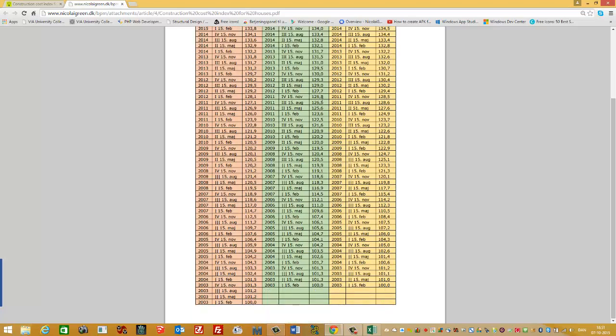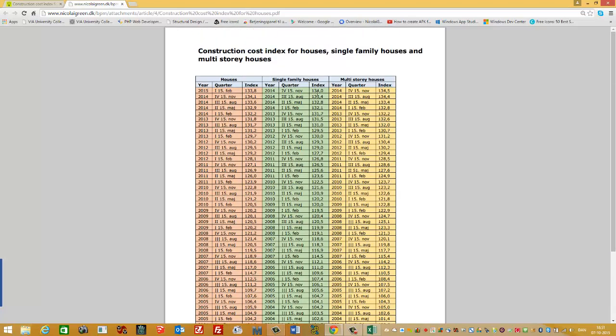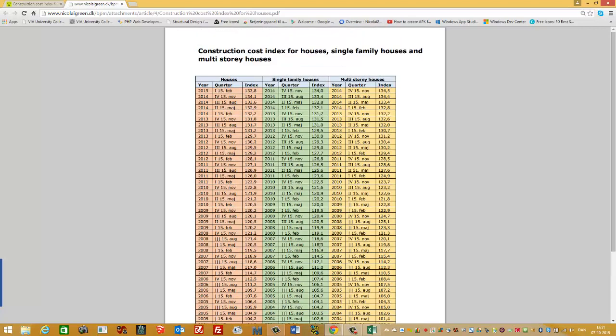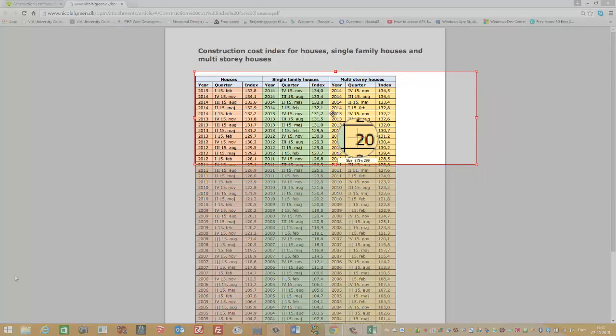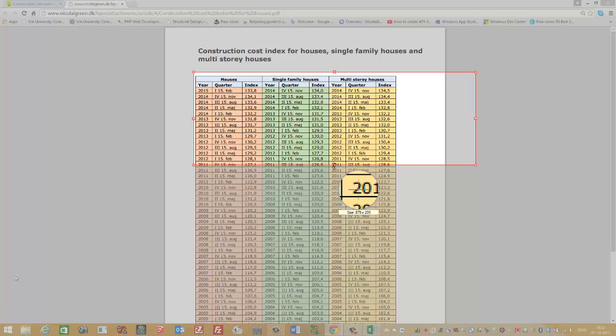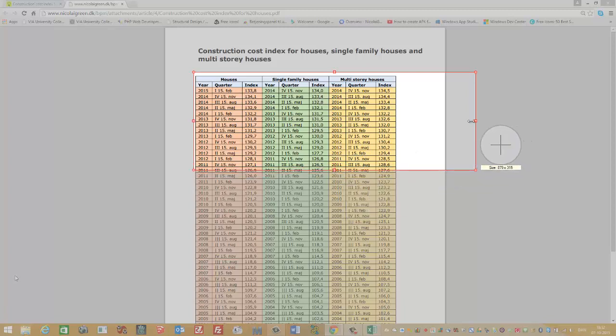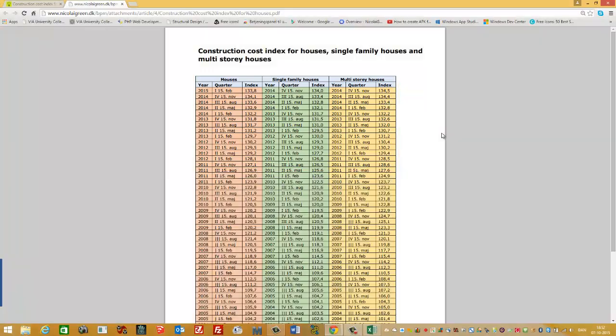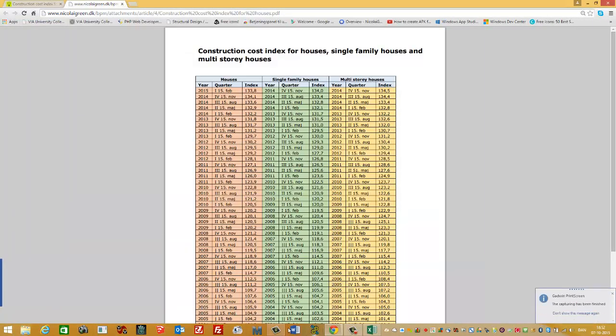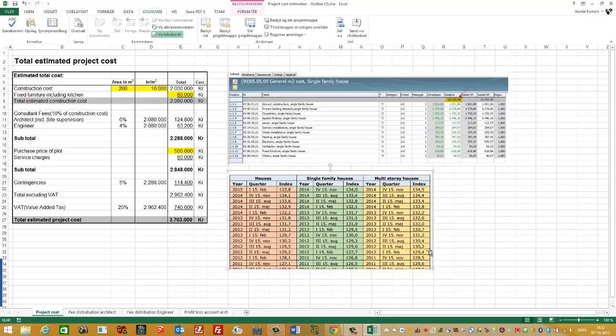In other words, you can say the price has increased 34% since quarter one in 2003. So this is the price increase in Denmark for single family houses. So I'll take a screenshot of this, the needed part, and paste it into the Excel program.